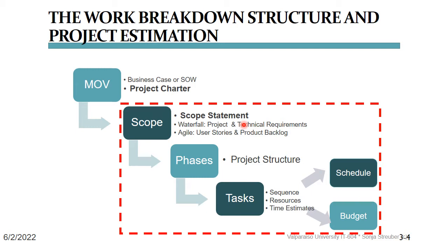So even in an environment that considers itself agile, you may run into detailed requirements, which are really already set in stone before leadership decides, based on the nature of the project, which project structure to use. Whether waterfall, that's usually with smaller projects where the scope has very clear boundaries, or agile, which is used usually with projects where the scope will change as the project evolves.